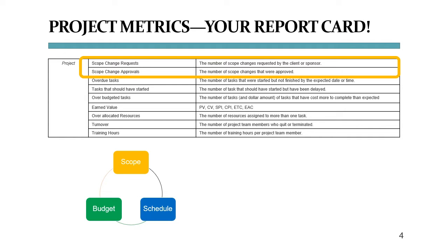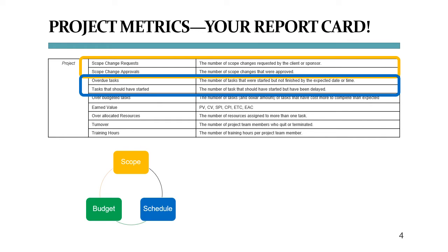The second major area here is obviously project schedule. It doesn't matter whether you're looking at overdue tasks and tasks that should have started but didn't in a waterfall structure, or if you're looking at decreases in velocity in an agile format, where work that was supposed to get done in one sprint wasn't finished and is rolling over into the next sprint, pushing more work down the line. These metrics speak to your ability as a manager to keep the team motivated, focused, and engaged.